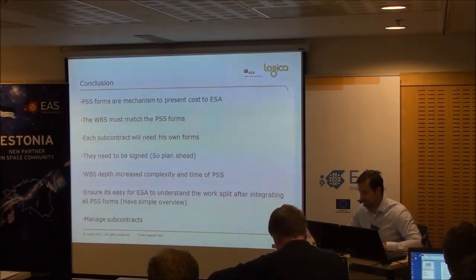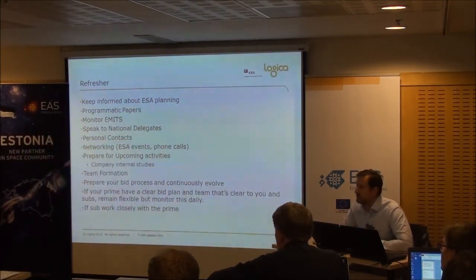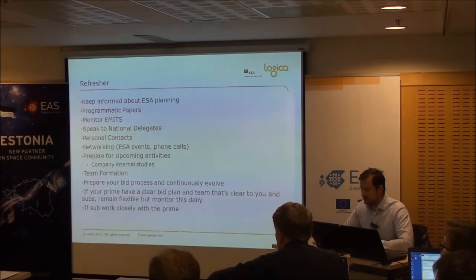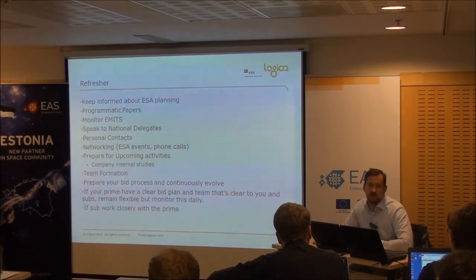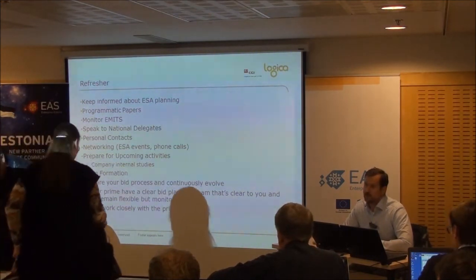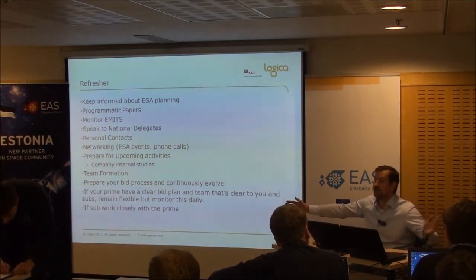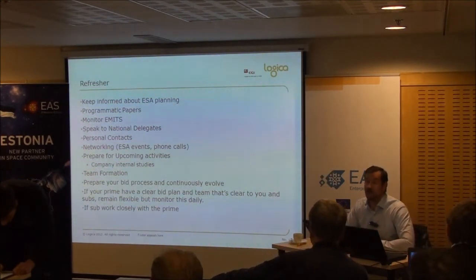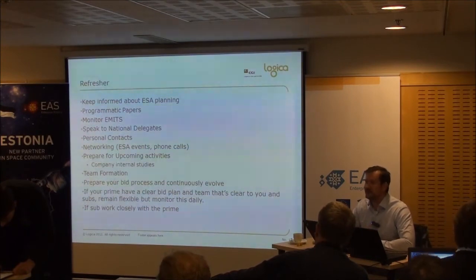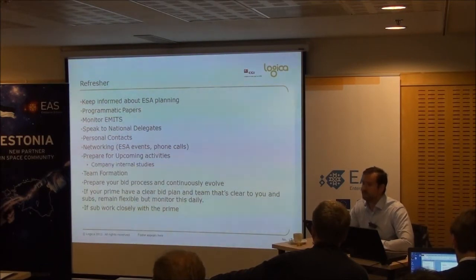So maybe on a PEX it's not so bad, because this is not necessarily a massive piece. But I'd suggest considering what involvement you have with subcontractors and whether you've got clear resources. If you've got two guys who are definitely going to be off for 4 weeks and can be on it completely, okay. But if you're dependent on 3 or 4 or 5 guys who have got a week here, a week there, no. Have someone overviewing, because you will get problems.